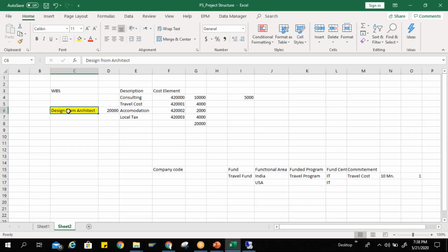After that we need to go for the negotiation with the architect. Third step, let's say, give the contract to the architect. These are all my multiple activities which have to be executed in certain sequences, and all these activities will have durations. People will be involved to execute these activities. That is the extended functionality which we have in network activities.